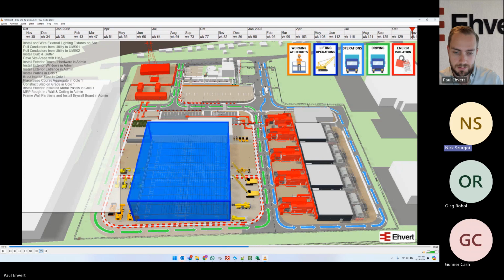So there is going to be a little bit of thread in the needle if we get stuck with that kind of redundant power layout. I'm right now doing my best to try to avoid that. But one of the real drivers behind the 4D scheduling is for something like that, that's going to be high risk work next to high risk work. Multiple crews working 6/10s every week. Like we really need to be dialed in on it. So yeah.